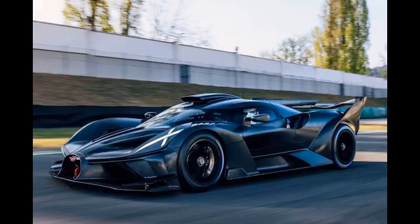Challenge 3: scope creep, managing feature requests mid-season. Numbers addition scenario: mid-season, a new sponsor, Nitro Energy Drinks, expresses interest in branding on car number 43. They request prominent logo placement on the car's front fender, which wasn't part of the original agreement. Solution: impact assessment. LJRC assesses the impact. While Nitro's offer is attractive, modifying the car's pre-painted livery with additional decals requires repainting the front fender, $800. Cost estimation: LJRC estimates the cost of repainting the fender to accommodate Nitro's branding request. Win-win negotiation.